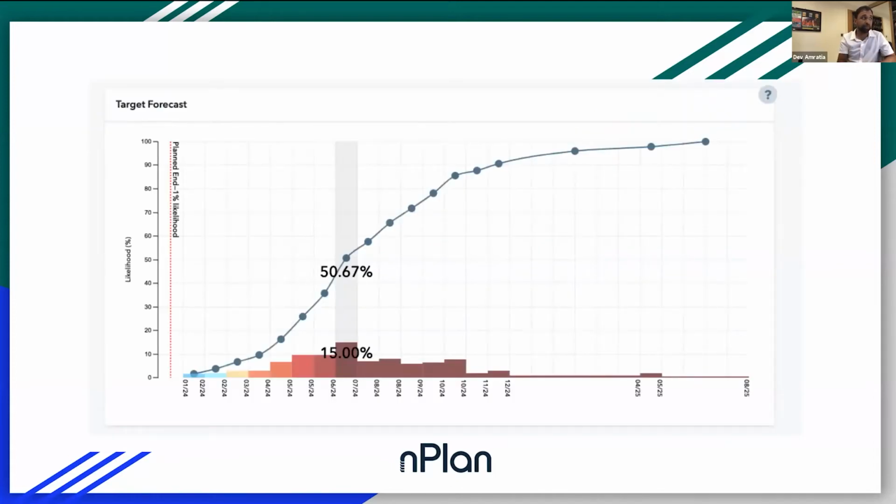A really simple screenshot, quite literally, from nPlan is this. This is what is known as a probabilistic, this is a probability distribution function. This is basically saying what is the likelihood of different end dates occurring on a project. So you think of it as the schedule file has come in, it's gone through its analysis, and out comes a result. And this is one such result of, looks like quite a long project, right? It's going to finish in 2024-ish.